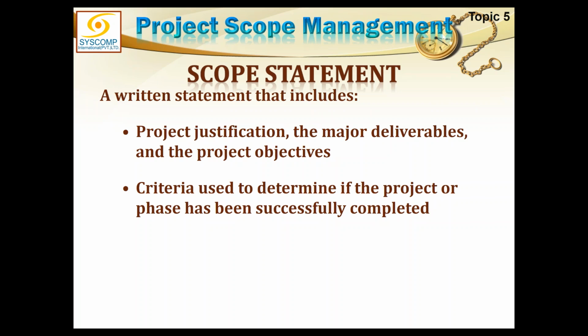So we have to define the ultimate completion of the project, how it is defined, how it will be proven, what is the criteria of checking the house or the wall, whatever is the product, when it is done. And also each phase. We had broken our project into surgically separate phases, and we said each phase could be treated as a project and will actually be treated as a project, because every phase will pass through the same cycle of initiation, planning, execution, monitoring and control, and close. So there is some deliverable of each phase, and if there is a deliverable for each phase, you must establish a criteria for the passing of that phase.